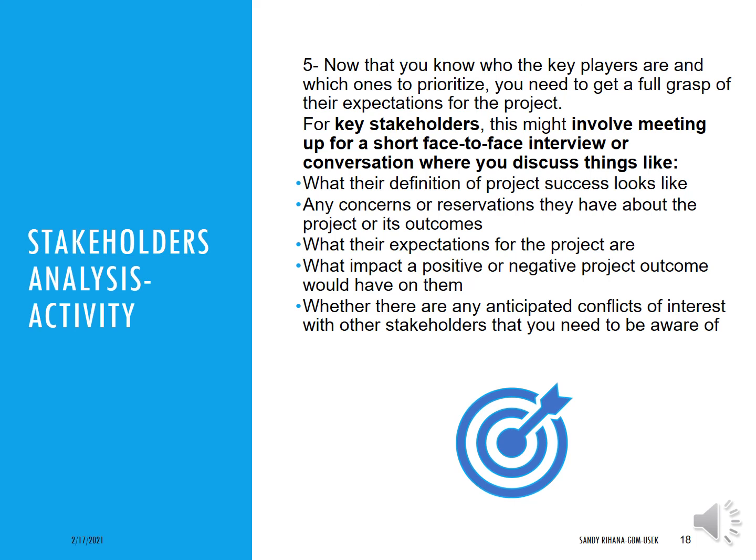So now that you know who the key players and key stakeholders are from this analysis, you can meet them face-to-face for interviews and conversations in order to discuss things, for example: how they define and view the project, how they view whether it was successful or not, whether there is any concern or reservation they have about the project or its outcome, what their expectations for the project are, what impact it has, positive or negative, and whether there are any anticipated conflicts of interest with other stakeholders that you need to be aware of, etc. All these questions can be asked of the stakeholders.